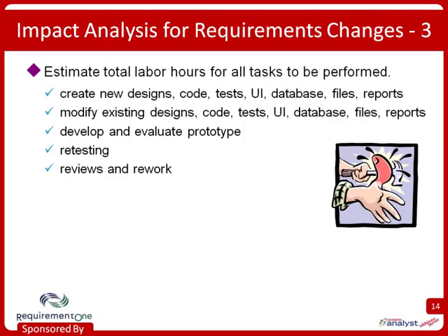Some of them are trivial and evident, so there's no point in doing any more work than necessary for that. But when you're confronting a significant change request that could have some maybe unobvious or greater than anticipated impact on your project, I think it's a very good idea to spend even a couple of hours doing an analysis like this so you can make sure people really know what the implications are and can make good business decisions.